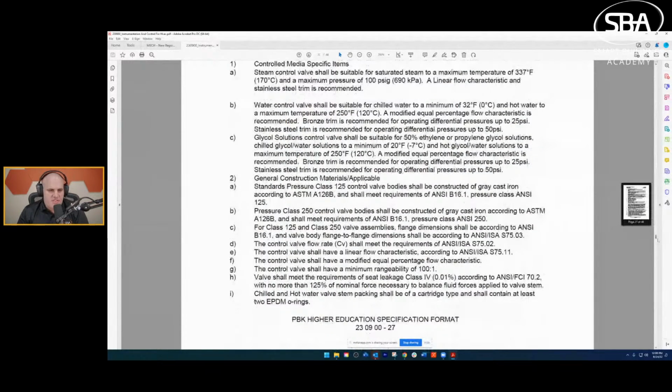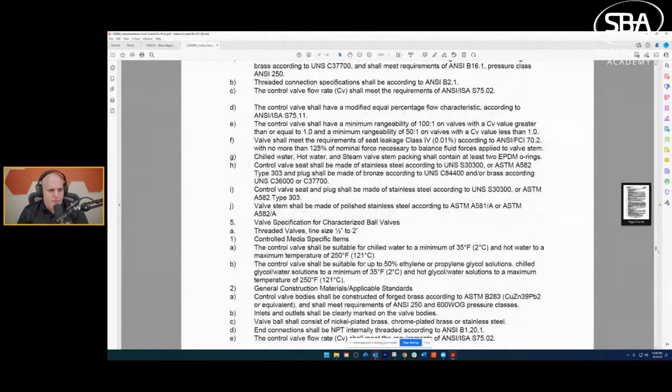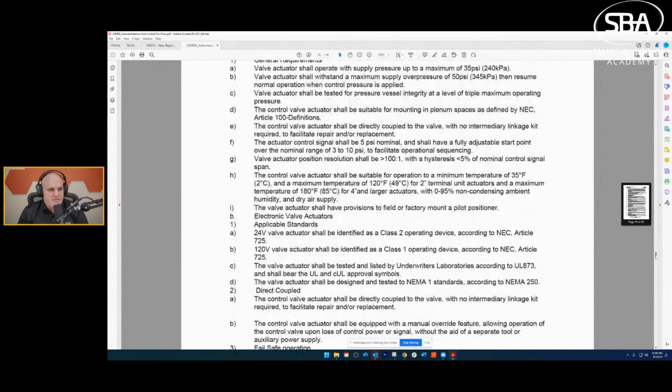This is something, just segue real quick, that is really important. I've seen people buy 1,000+ room sensors only to have to find another job for them because the spec'd a specific color to the room sensors, and that was missed. And they bought white, and I think it was like off-white beige that they had to be. And because of that, they actually had to go and use those sensors on a separate job. So there's something to be cognizant of.